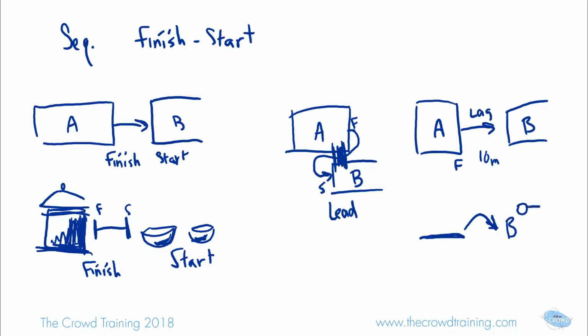Maybe that's what activity B is: I've got trucks that are going to drive on it. Well, we really don't want them to drive on wet concrete because you're going to get stuck. So we put a lag or a wait behind it. But in any of these situations I've just drawn, it still all has the very simple finish to start sequence relationship.